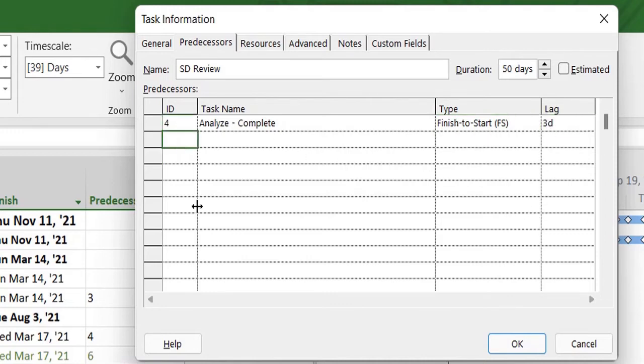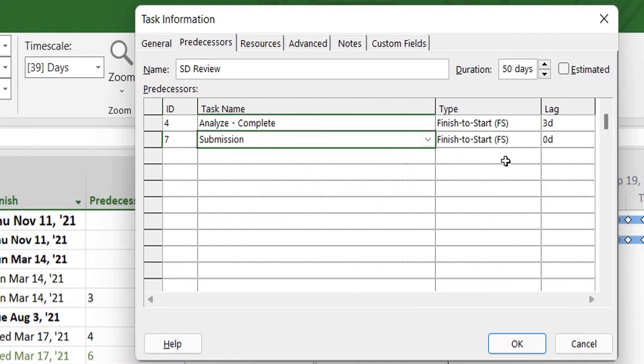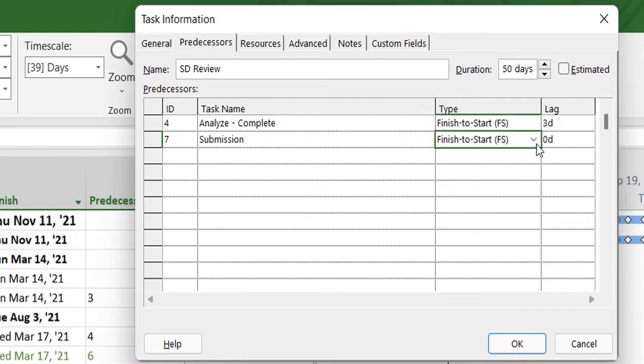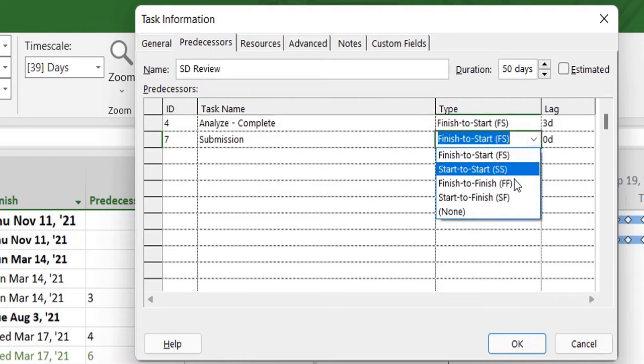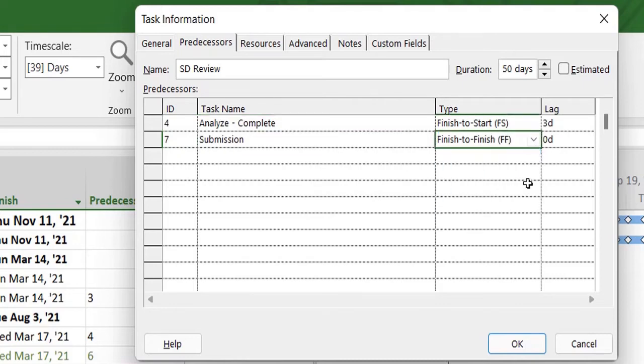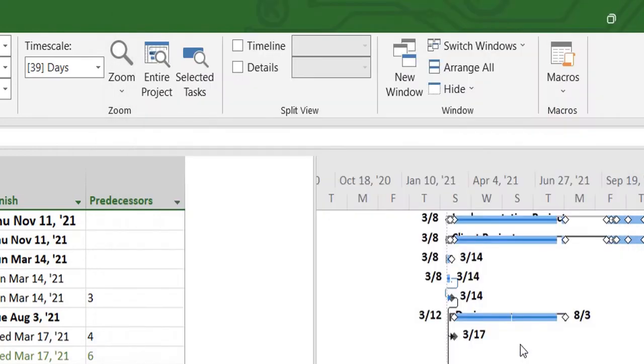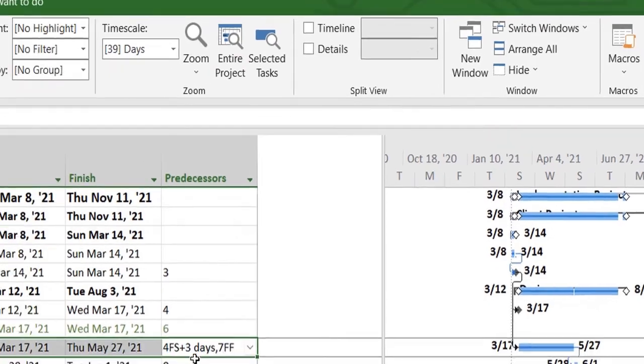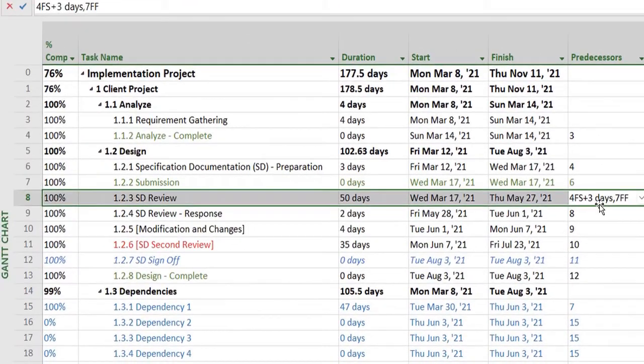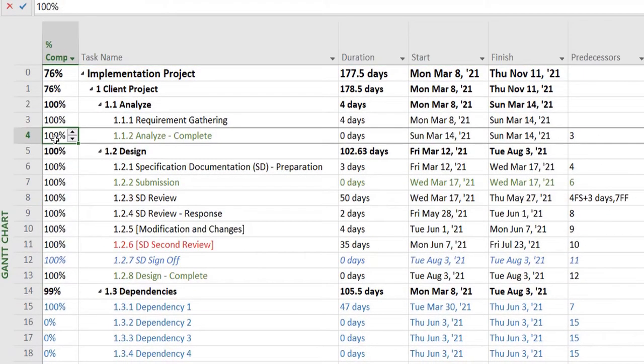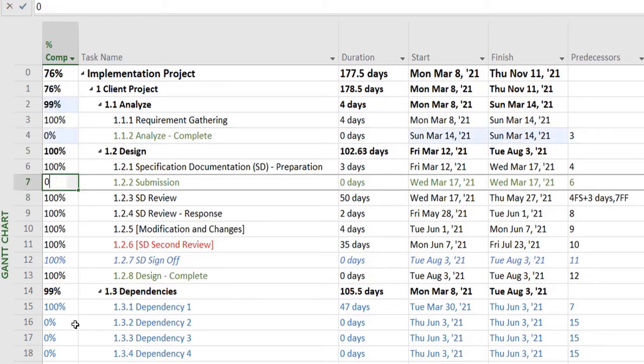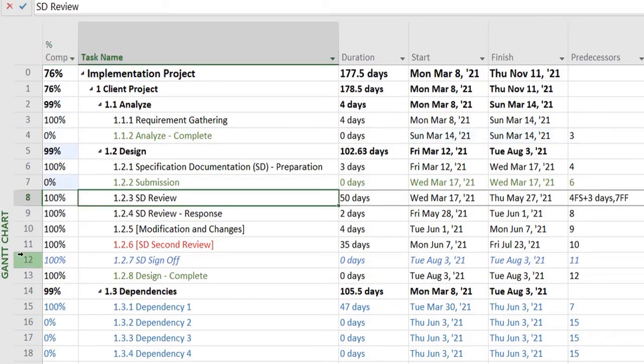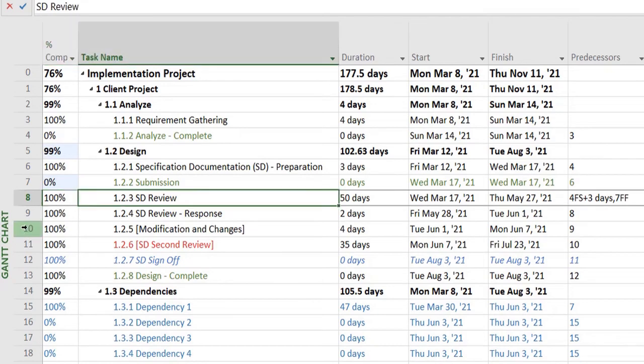Let's say I want to create a relationship with task number 7, and I want to mention it as finish-to-finish without any lag. You can see it shows the predecessors details over there.